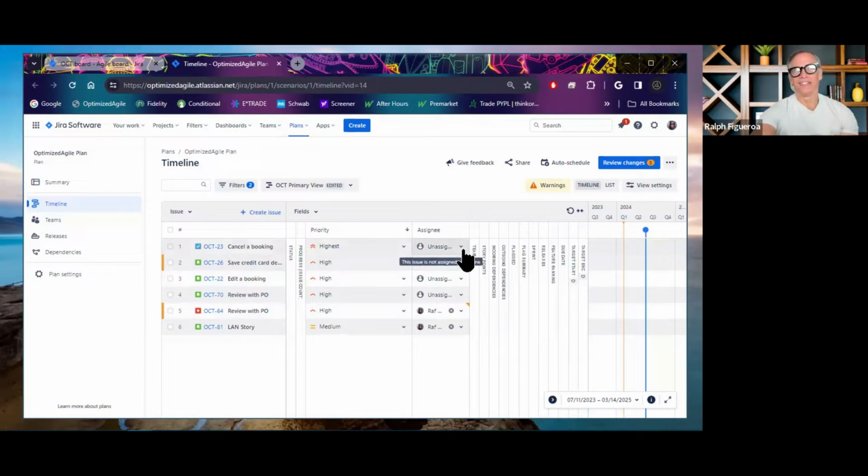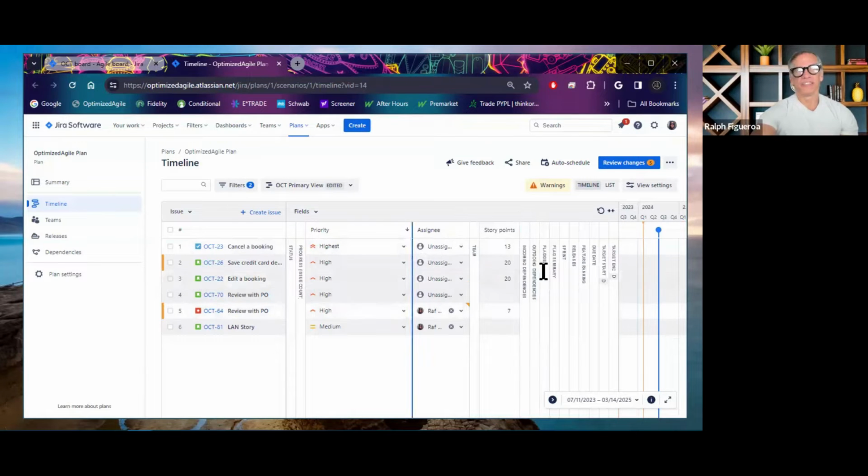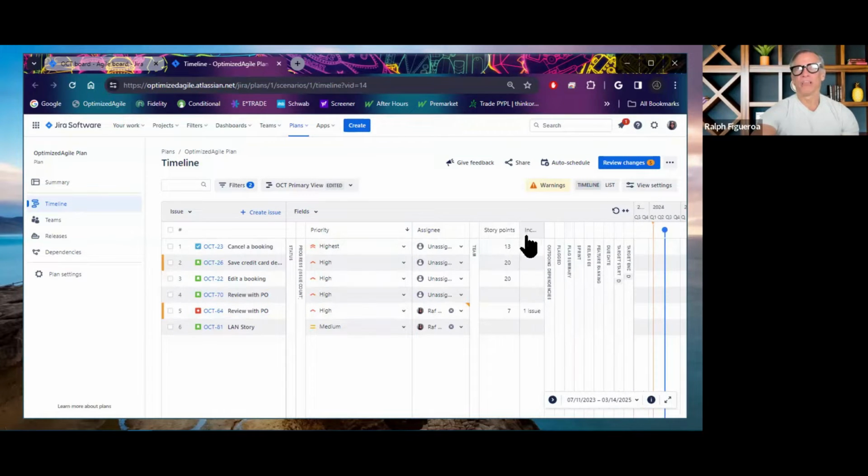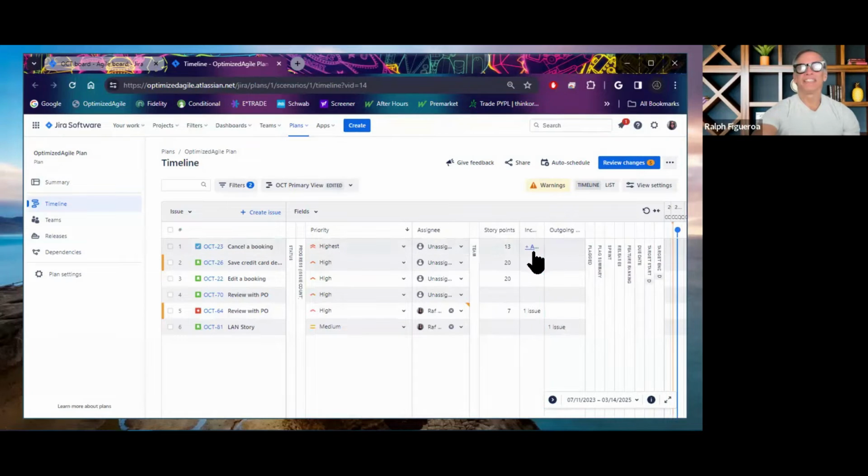And so usually this actually wins the team over considerably. And then you can start refining, having conversations about, oh yeah, we have dependencies. Let's just, during the backlog refinement sessions, refine the story points, taking a look at the multi-line fields. You are not supported in Jira Advanced Roadmap, so you cannot see the description in order to see the acceptance criteria and the details of the stories.